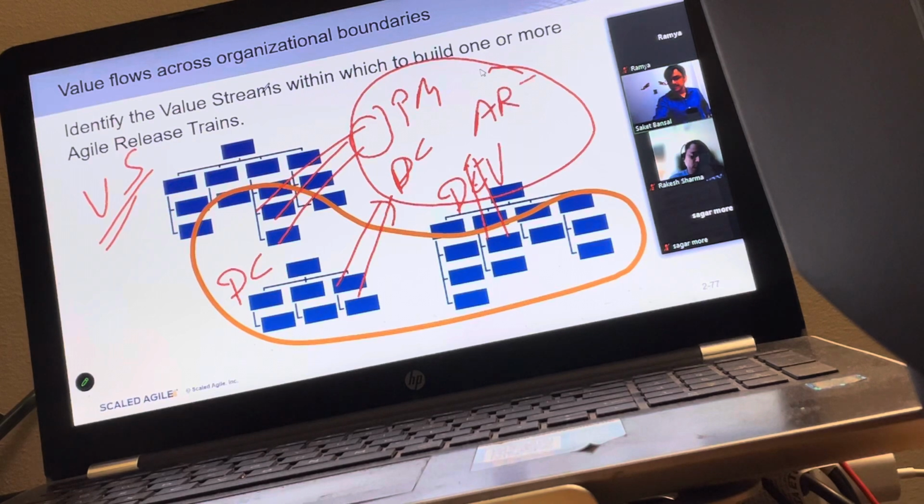When you are forming a new agile release train, you may need to bring people from different geographies and different areas, because you should see the customer flow rather than the geographical flow. It's not like India team, US team, Middle East team. It's more like, oh, credit card customers: the business understands the user behavior from the US. These guys are supporting the data center for the same business, credit card customers. And these are the people who will maintain the application related to credit card customers. Let's bring everyone into one agile release train so that they will be able to do requirement elicitation, feature part from the US, development part from India, maybe deployment and support part from the Middle East. So overall, we will take care of our credit card applications and their users.